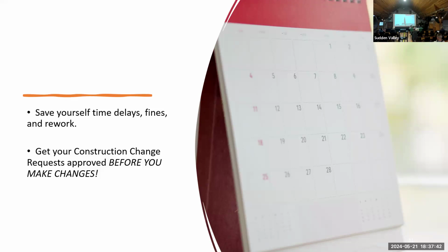The committee is in charge of exterior changes. So save yourself time delays, potential fines, having to go back and rework. You submit those construction change requests ahead of time before the inspection happens, and then it's going to add time to your project. Before you do the work. Yes. Before you do the work.